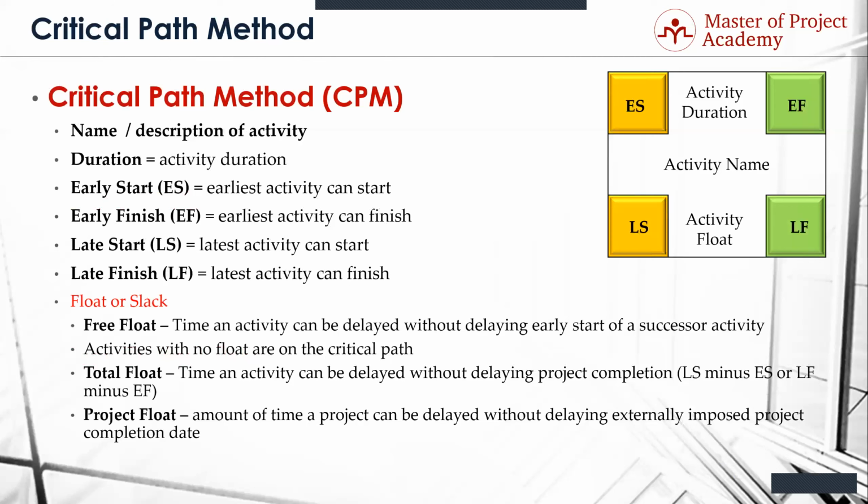Make sense? So it can be a good thing or a bad thing. A lot of people don't like that term because it sort of implies, you know, I got plenty of time to do it. And it could invoke something called Parkinson's law, which basically is work expands to the time allowed. So if I have till the end of the year, why am I doing this in April? Why not take the rest of the year? There's a lot of reasons for not doing that or doing that. You have to kind of make those judgments, but that's the concept of project float. Primarily, we're going to focus on total float.